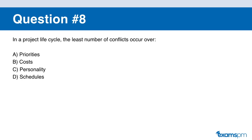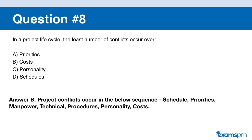Question number eight. In a project life cycle, the least number of conflicts occur over: A: priorities. B: cost. C: personalities. D: schedules. If you said B, you are correct. Project conflicts occur in this sequence: schedule is number one, then priorities, manpower, technical, procedures, personality, and then cost — meaning cost generates the fewest conflicts.